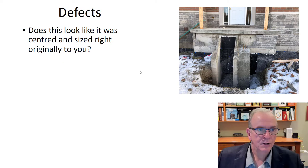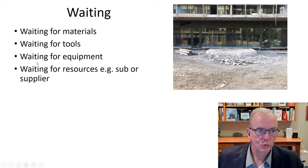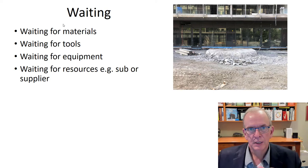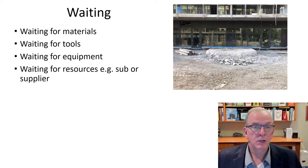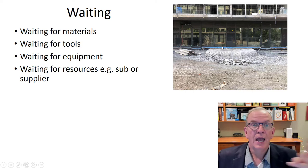Waiting — waiting for materials, tools, equipment, resources — this is a big one where supply chain management becomes important. It requires commitment from the trades involved and different kinds of contracts. Sometimes sub-trades don't want to be involved in upfront planning, but you need them there because later they'll say 'this slab can't be there.' Better to identify that ahead of time. Yes, they waste a few hours in meetings — but that's better than days with jackhammers.